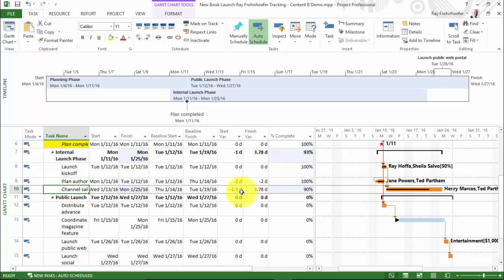and you'll notice that I started a day and a half early, and I am extending the task out a little bit, which means that a couple of other tasks got extended out just a little bit as well. Any of the dependencies on that. And actually, it turns out there are no dependencies, so that one didn't move out at all. So that ends our navigation session.